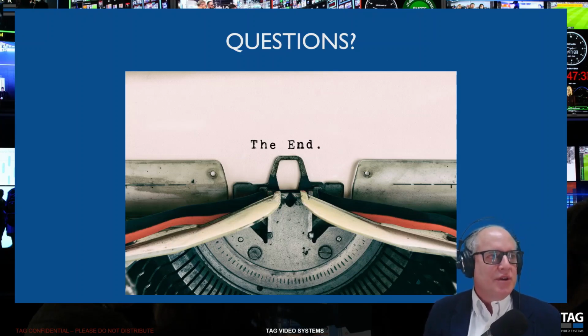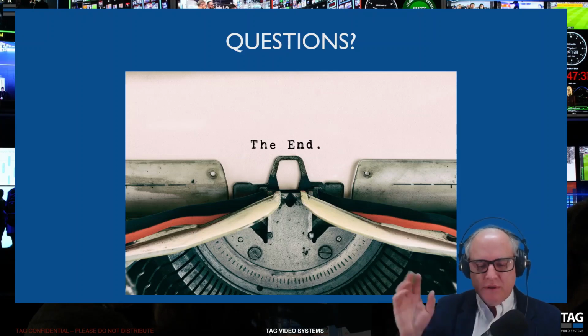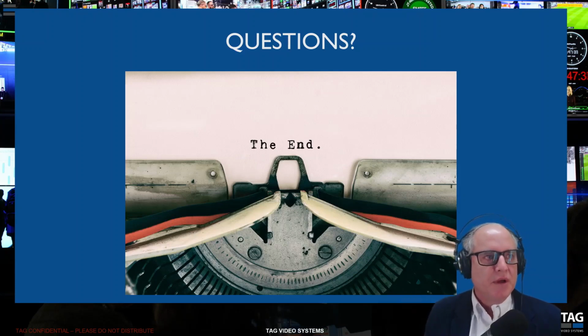So I tried to take a shortcut and I asked each of the vendors to supply an all-in cost worksheet, and that didn't work out so well either. Out of the over 20 vendors I evaluated on that particular project, only one actually provided this information, so that didn't solve my problem either. I still needed to figure out how to get a handle on those costs. So finally I realized some shortcuts as I was building these worksheets. The first one is that the common costs are independent of what vendors I choose. The cost of moving content to and from the cloud is going to be the same. So I could actually model those separately and only do it one time.